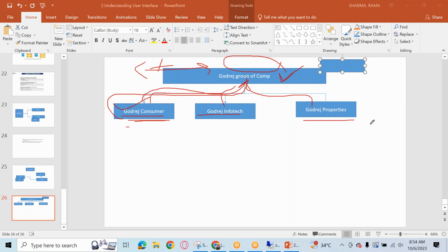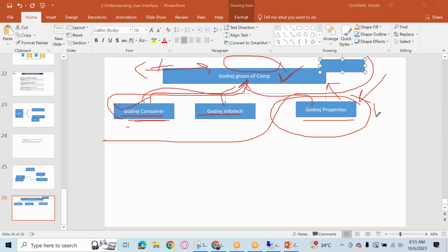Another way, let's say you are going to implement SAP PPM only for Godrej Properties, where it is going to send all this data in a different way. Let's say it can be sent through BW or some other provision to show in the dashboard. In that case, Godrej Properties will be the portfolio definition, and within it, residential and commercial will be my next level of bucket. So these are the primary things we need to understand about how we are going to create buckets here.